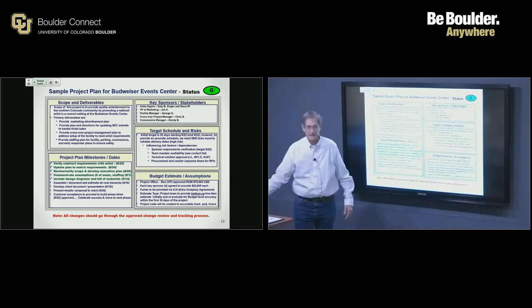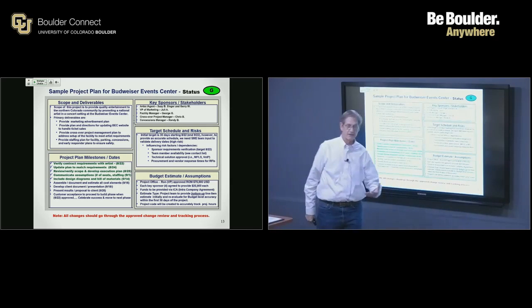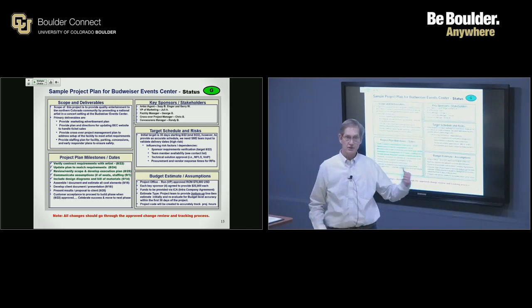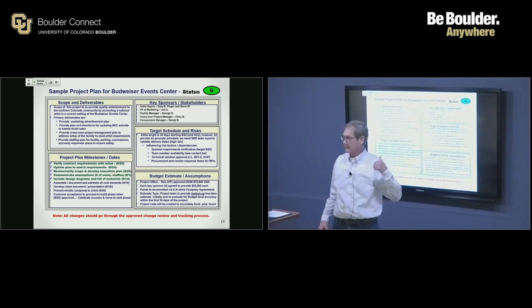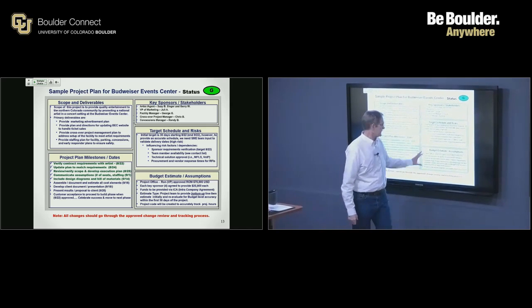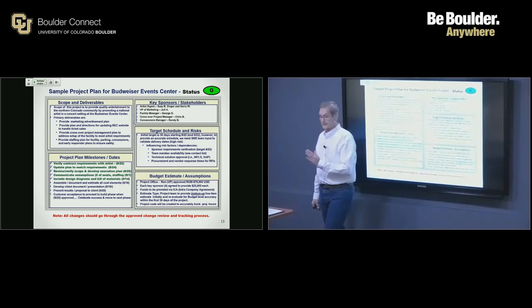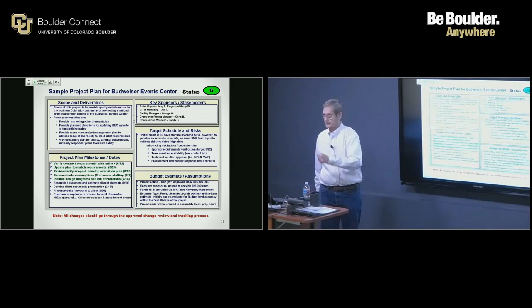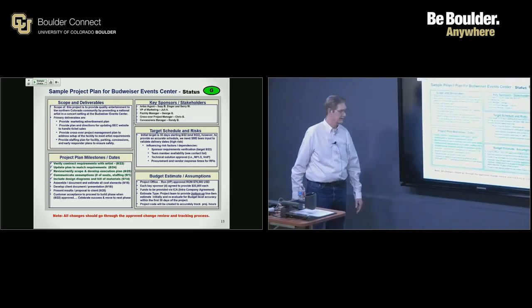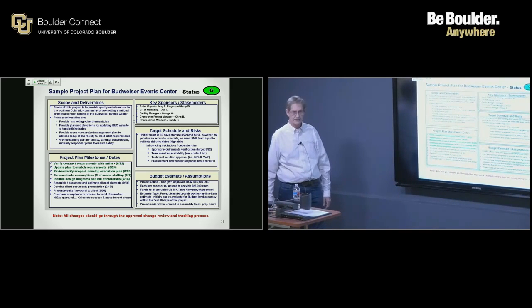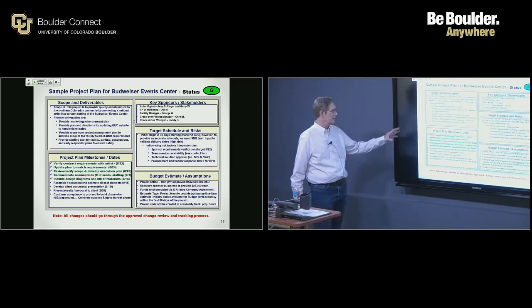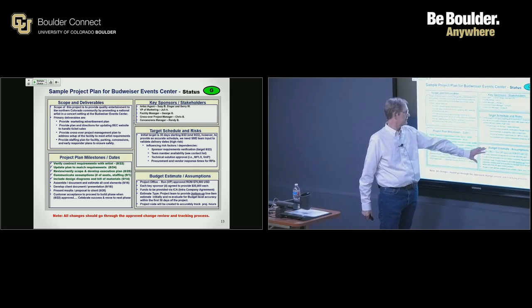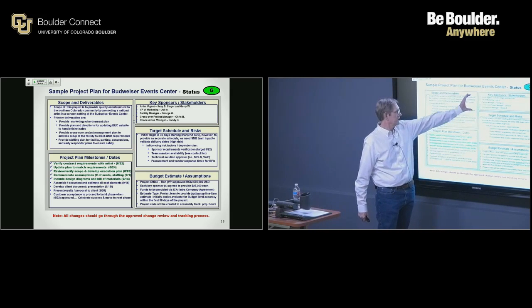So, at the program management level, I'm reviewing multiple projects, and you're reporting status. Boom, green, yellow, red. So this is a great way to kind of blast through in a fairly consistent manner, looking at multiple projects. IBM does this. They have 7 keys. PricewaterhouseCoopers uses 7 keys. And this is just kind of a summary level. Budget and assumptions, target, schedule, and risk, key stakeholders.